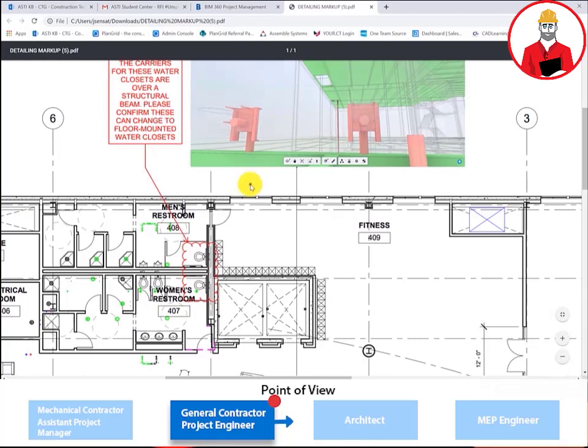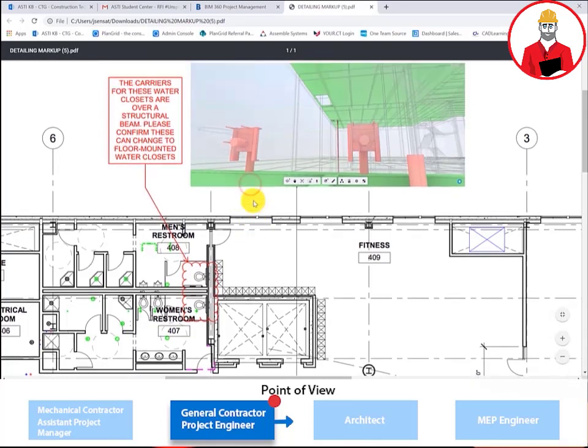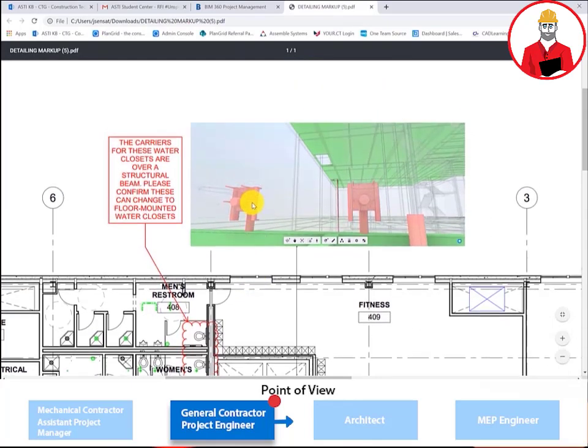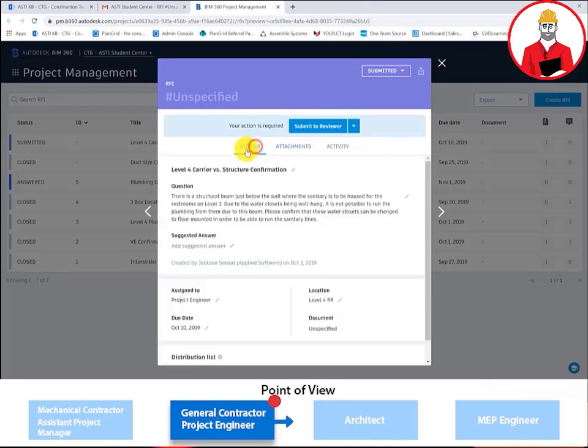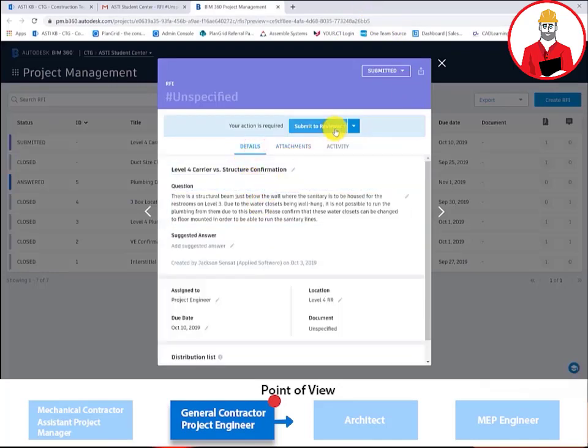This one will be a doozy. We're going to have to involve the architect and the plumbing engineer. This RFI is valid and needs to be entered soon to meet the coordination schedule. I'll go ahead and send this to the architect and the engineer.